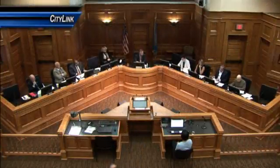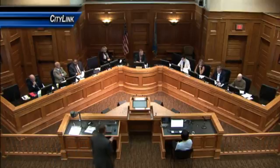Okay. Thank you very much. Councilor Jameson. Jim, if we could, the similarities between the event center and the indoor pool, you say are pretty similar. And so at what point, I mean, we've all thought and talked about how much money would be spent on the indoor pool, but there's a point in here, though, we could add more money to it, right? I believe so, yes. If indeed the recommendation came back that the guaranteed maximum price was higher than what you had originally envisioned or authorized, then they'd have to come back to City Council, I believe, for that approval.